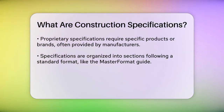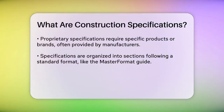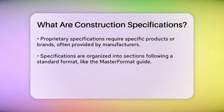Proprietary specifications are used when a specific product or brand is required. These specs are often provided by the product manufacturer and include detailed information on how to install and test the product. This type is commonly used in renovations where specific materials need to match existing ones.